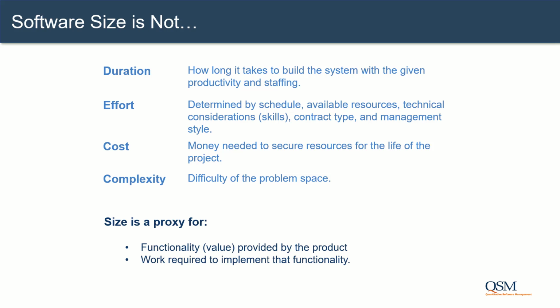Schedule, effort, cost, and complexity are influenced by size, but not equivalent to size. It is especially challenging for folks used to bottom-up estimating not to specify effort as a measure of project size. We'll see soon that time and effort are trade-offs, so how much effort is required is driven by the schedule, and vice versa.